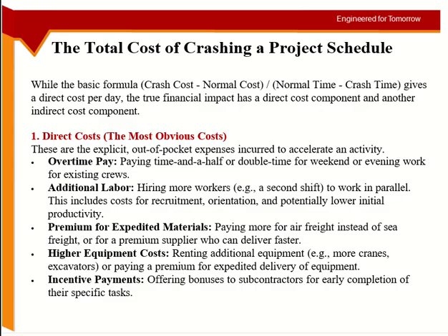Higher equipment cost: you may be renting additional equipment, or getting the equipment from another company, or from somewhere outside Bahrain, and that company says that we have a premium service. If you pay us the normal fee, we will deliver the equipment in 10 days. If you give us a premium fee, we will deliver the equipment in like 1 week or so. And then you have incentive payments which you give to the subcontractor.